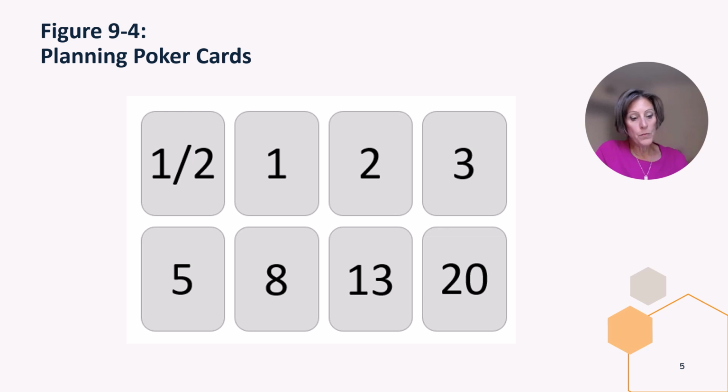Team members report their progress by answering the following 3 questions. 1. What did I complete yesterday? 2. What will I complete today? 3. What obstacles, if any, am I encountering?